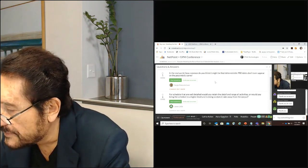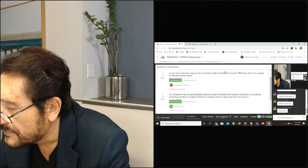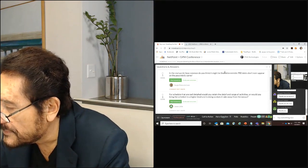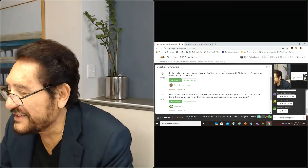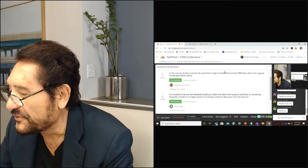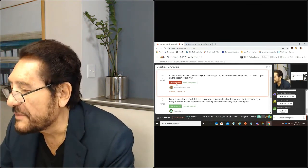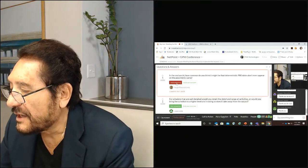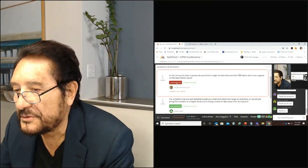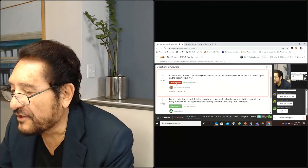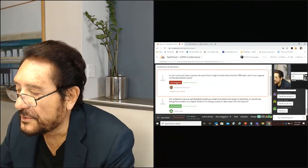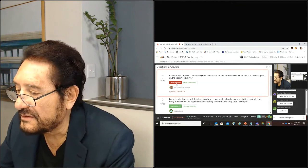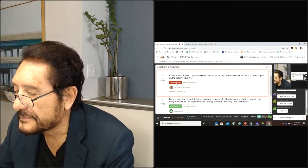A question from Sergio: in the real world, how common is it that the deterministic P80 date doesn't even appear on the pessimistic curve? The answer: it would appear below P10 most of the time. Ninety out of 100 deterministic schedules we simulate have a completion date that is less than P5 — so there's less than a one-in-ten chance it even appears on the pessimistic distribution.